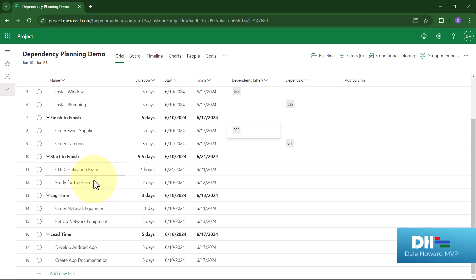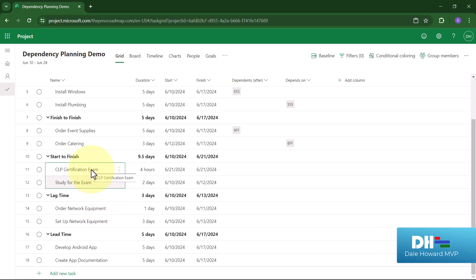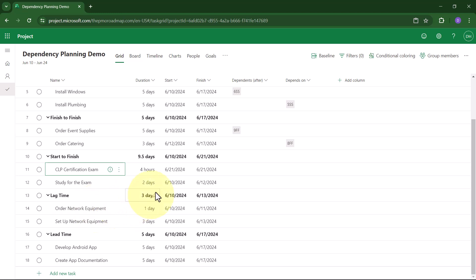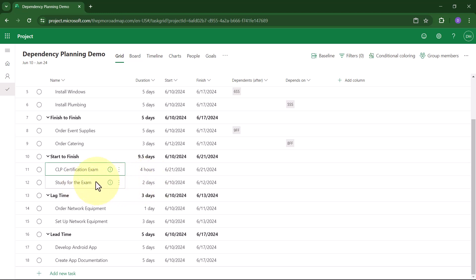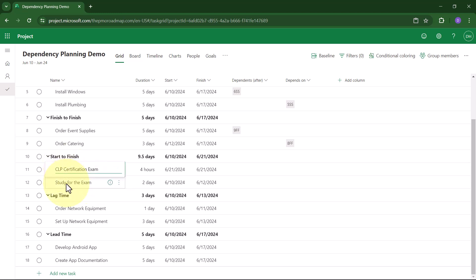I have two tasks in a row that are a weird backwards combination. I'm going to take the CLP certification exam on Friday, June 21st. I also need to study for the exam for two days. In this situation, the certification exam is the driving task. That's the task that will determine when I need to begin the studying. So what I need is Start-to-Finish.